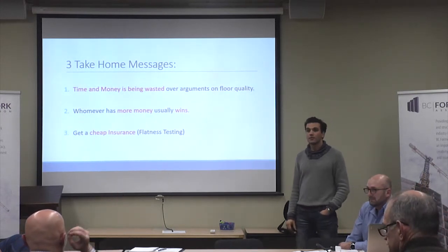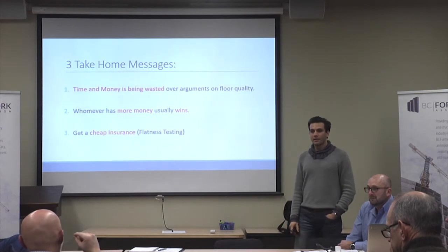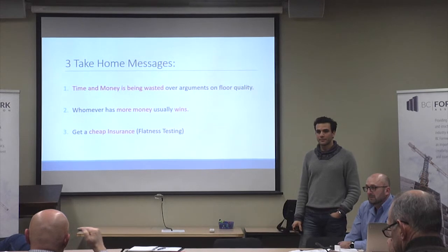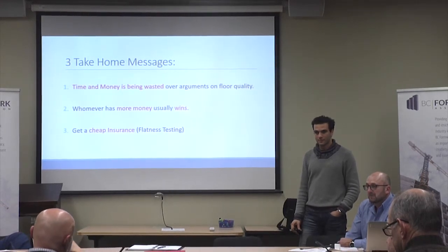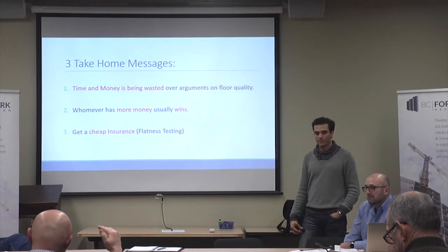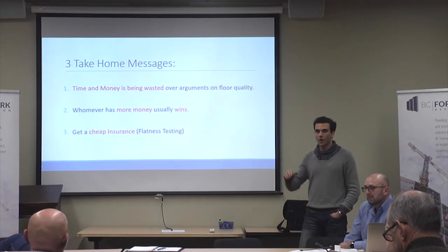One thing I want to make very clear is that there are different FF and FL number requirements for different types of floor coverings. Exactly. Although an FF or FL of 25/35 may be standard for carpet, which is fine, for a large format ceramic tile, which is now 24 by 24, or hardwood floors, it's actually FF 45.